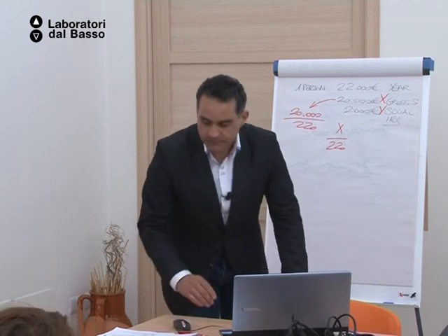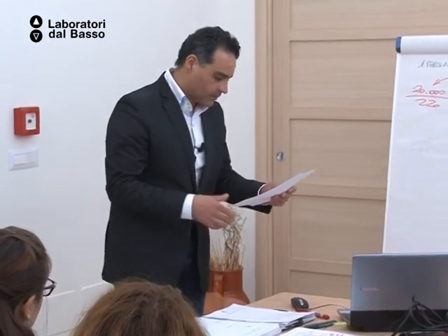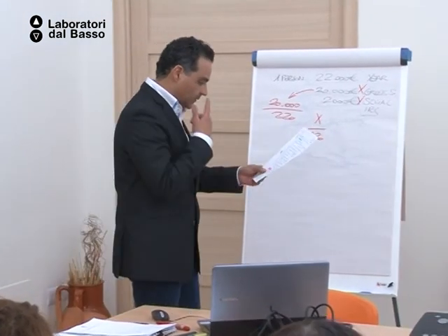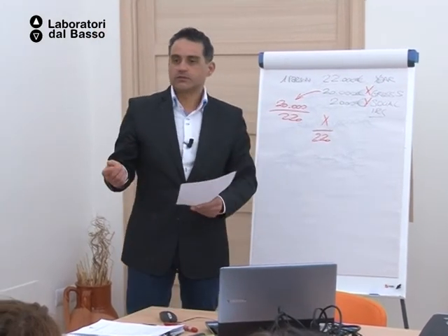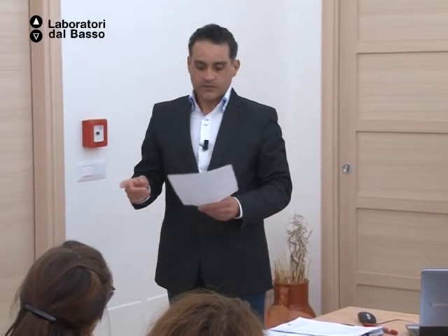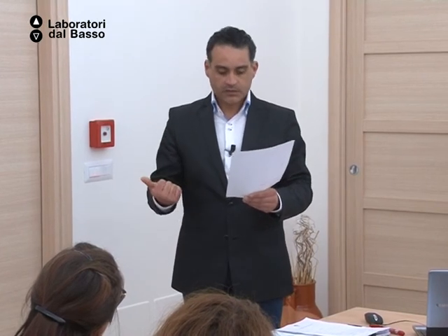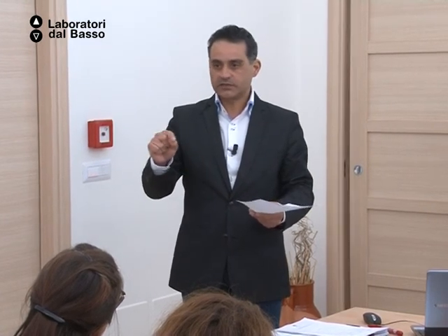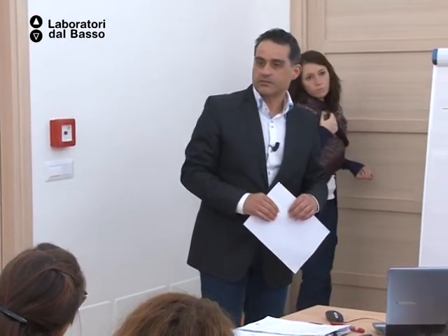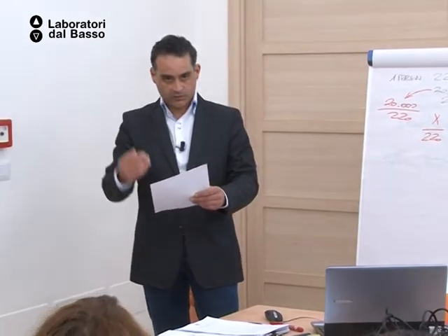so here, you see, let me see if I have something else to say then. Number of days, be analytical, payrolls. Yeah, when you consider the cost of the staff, you consider the pay sheet according to the country law. So you will use the pay sheet for the months, and you know analytically that your staff have been involved in the project. In Portugal we have 40 hours a week, 160 hours a month. It means that if I work 35 hours on the project, it will be there according to my timesheet.